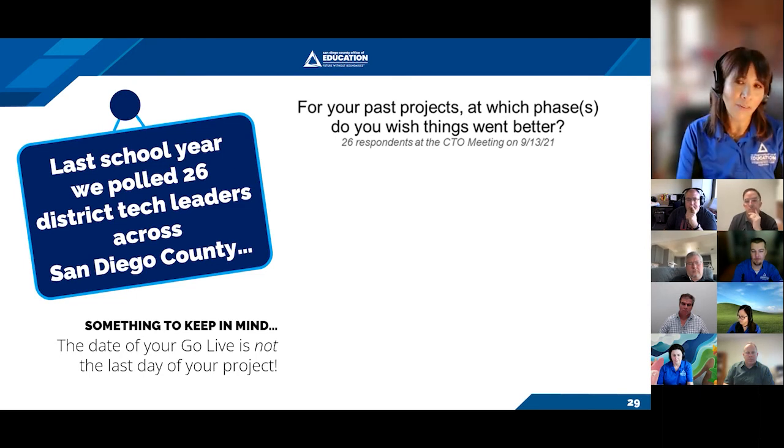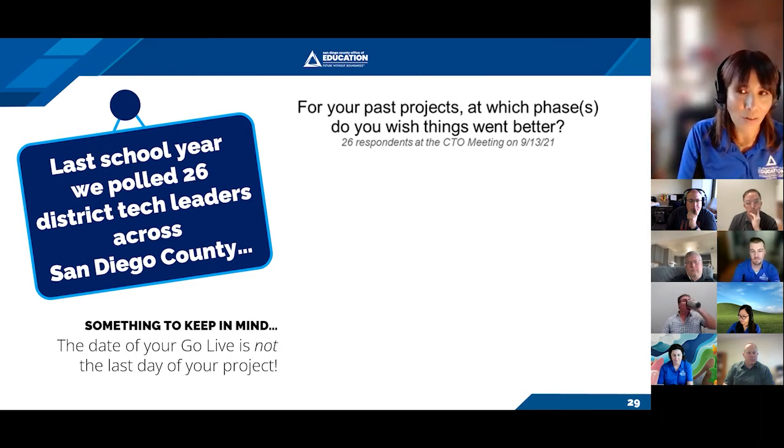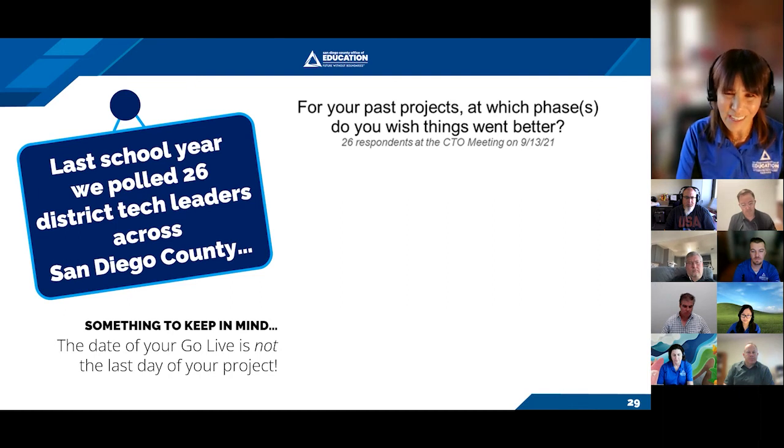So a key takeaway here for you is to keep in mind that the date of your go live is not the last day of your project. There are things that happen after the go live. Risa just talked about getting ready and day one support, but you now have this solution that is a living thing, be it hardware, software, a process, a new thing that's happening. So we need to build in time to make sure that we learn from the project, we get feedback around the project, and that we properly archive and set ourselves up for success. So a year later, when we're doing something similar and we're saying, oh, we could use that project charter, let's just copy that one. Well, where is it?